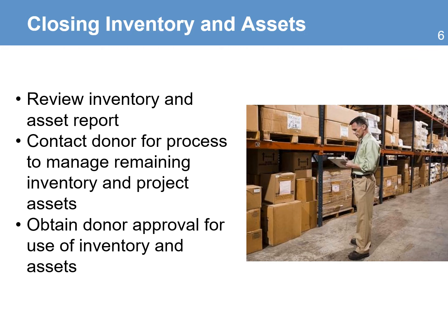Another important step is the closing of inventory assets. Review the inventory and asset report. That will give you a list of all the items that were purchased with the donor funds that were not used by the project or distributed to beneficiaries or the communities. Contact the donor for guidance on the process to manage all the remaining inventory and assets. Donors have specific clauses and specific procedures about what you should do with that excess inventory. Just because there seems to be no use for excess inventory doesn't mean it belongs to the project or to the organization.